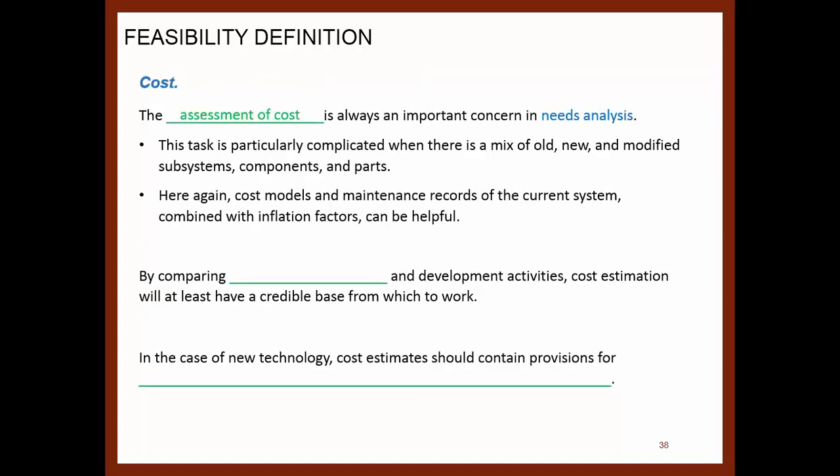Cost. The assessment of cost is always an important concern in need analysis. This task is particularly complicated when there is a mix of all new and modified subsystems, components, and parts. Here again, cost models and maintenance records of the current system combined with inflation factors can be helpful. So for instance, economic analysis, your course in engineering economy is relevant at this point. You're going to use these inflation factors, you're going to use net present worth analysis or annual base analysis to try to assess the cost for your system.